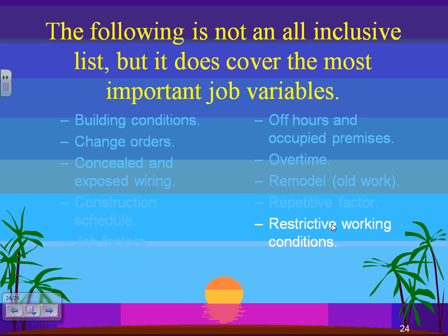Contracting, my friends, 45%. Take this: if I'm doing service entrance conductors, changing service from 60 amp fuse into 100, and I've done tons of them, right? If it takes me $1,600 to change that one, I can cut it down to almost half of that, $800-900. I'm proficient. I know how to do it. I do it fast. So who cares?